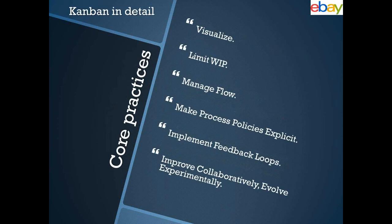Going into the practices of Kanban — how do you actually operate using Kanban in Agile development? You visualize what you need: your whole board, your workflow, and the different to-do lists in your product. Limit the work in progress — don't take more than the maximum limit. Manage your flow: understand it from start to end, what each task of your product needs to go through. Make your processes explicit so that everyone understands the life cycle of what each task is going through.